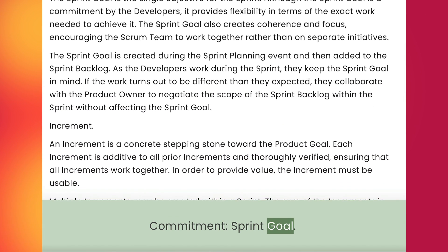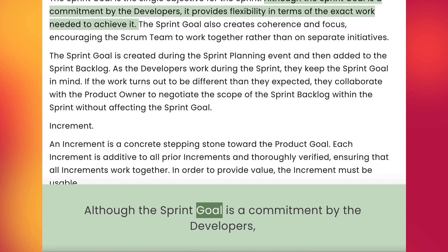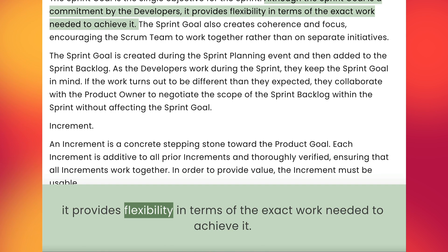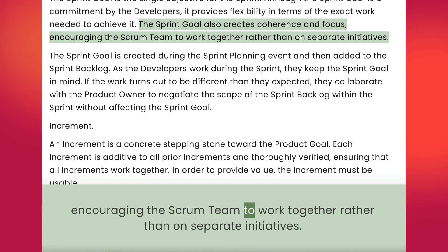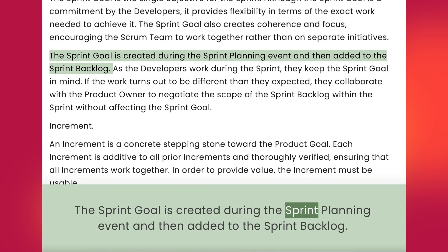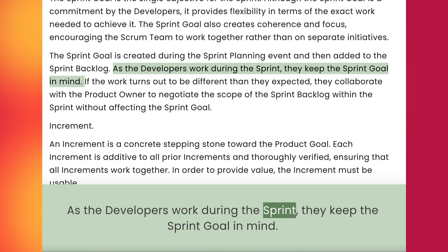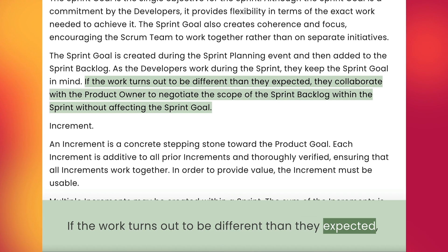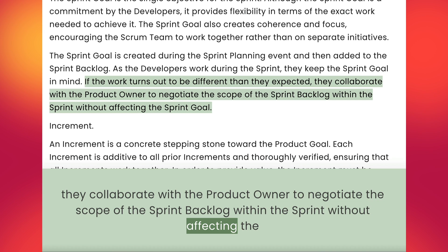Commitment: Sprint Goal. The sprint goal is the single objective for the sprint. Although the sprint goal is a commitment by the developers, it provides flexibility in terms of the exact work needed to achieve it. The sprint goal also creates coherence and focus, encouraging the Scrum team to work together rather than on separate initiatives. The sprint goal is created during the sprint planning event and then added to the sprint backlog. As the developers work during the sprint, they keep the sprint goal in mind. If the work turns out to be different than expected, they collaborate with the product owner to negotiate the scope of the sprint backlog within the sprint without affecting the sprint goal.